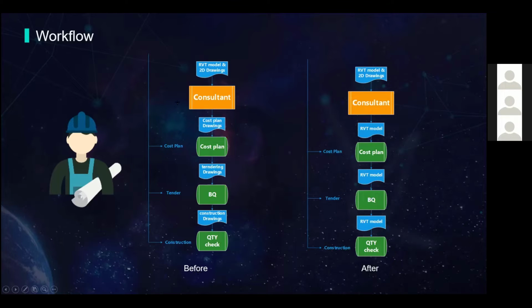This is when you have all of this information in place, but if you have a Revit model and don't have those 2D drawings, how do you deal with it? You have the Revit model in between every cost estimation because you follow the same model in every stage. It's under development: at one stage it's maybe 100, going to 200, 300, 350, 400, 500, but at each of these stages you have QB cost side by side.